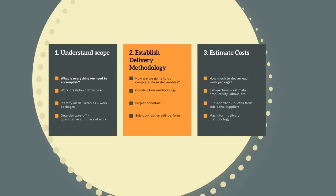In step two, we need to establish our delivery methodology — how are we going to complete the required deliverables? This involves developing our construction methodology. Step two will be heavily related to procurement and the development of the project schedule. We'll put a lot of focus on the timing and resource requirements needed to complete the work. By the end of step two, for each package, we should know whether we plan on subcontracting or self-performing the works and exactly how we plan on delivering the work package.